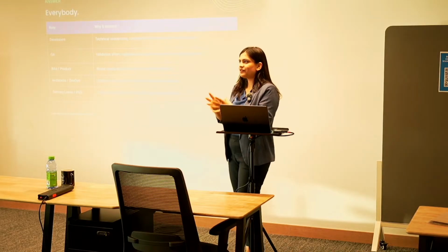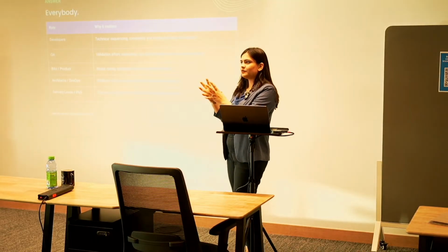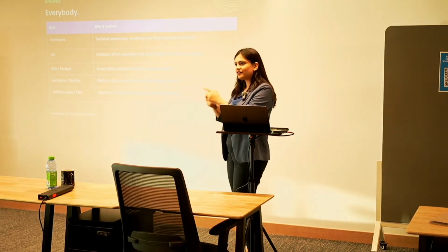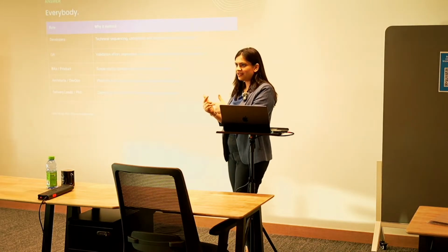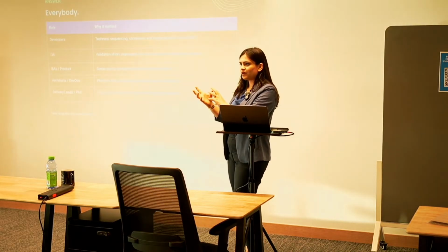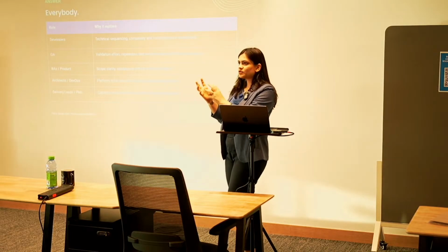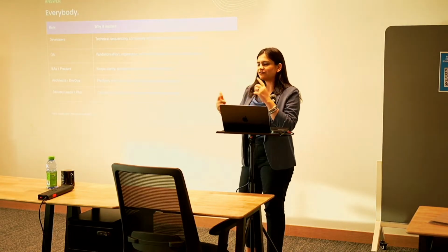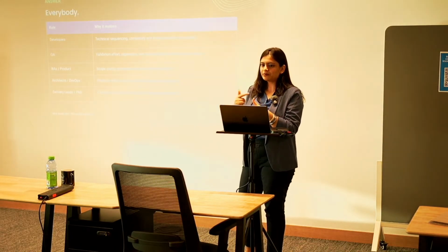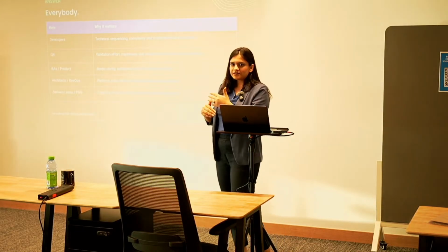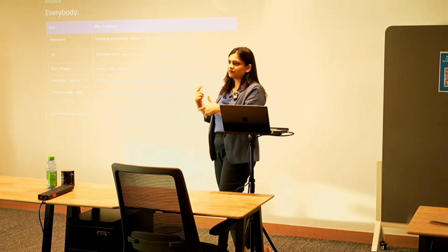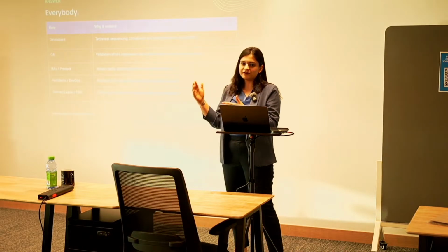That's one point. But every time the product backlog gets converted into a sprint backlog, you have to do a round of prioritization again: within a sprint, what do we pick up, what do we solve for, what are the most important bits, and so on and so forth. So I feel it is never a one-time activity, but a repeated set of activities that you need to keep doing at different points in time.